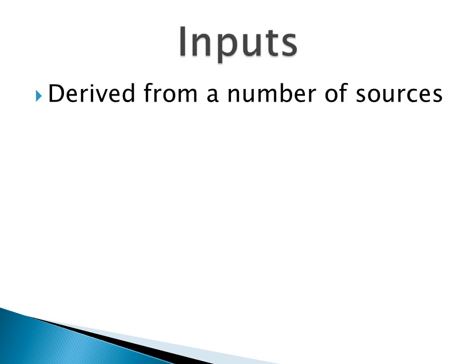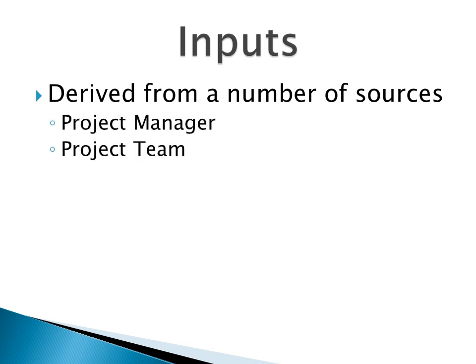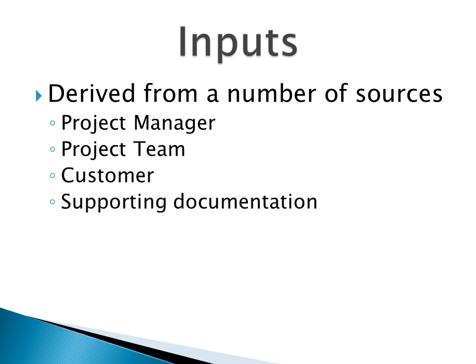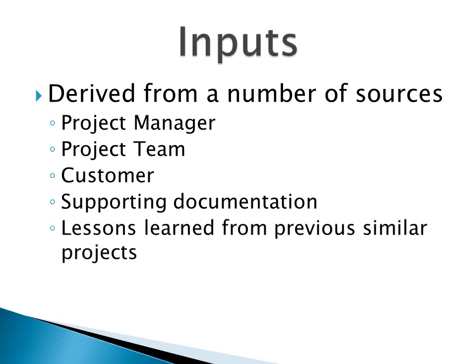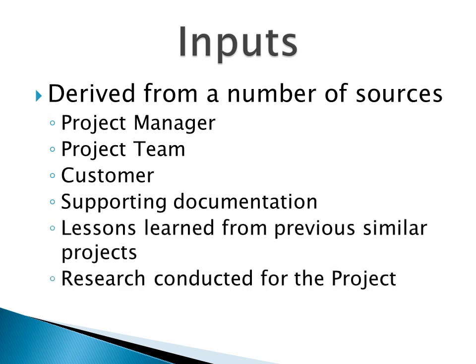In order to create a complete assumptions and constraint analysis, it is important to derive information from as many sources as possible, such as the project manager, the project team, the customer or customers, any available supporting documentation, the lessons learned from previous similar projects, or any research that was conducted specifically for the project.